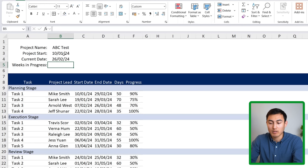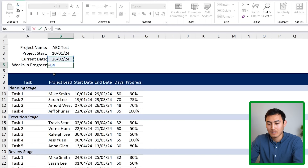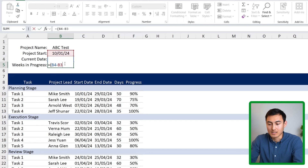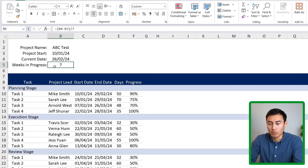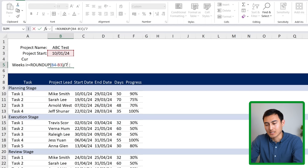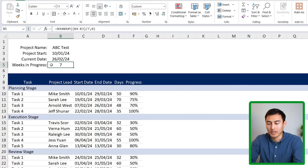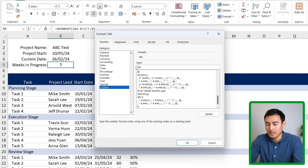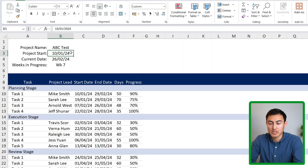For weeks in progress, we take the current date minus the project start date to get days, wrap it in parentheses and divide by 7, then wrap the whole thing in ROUNDUP with zero decimals. We reformat the cell using Ctrl+1, going to Number and typing 'wk #' as a custom format — so it displays as 'Wk 7', for example.